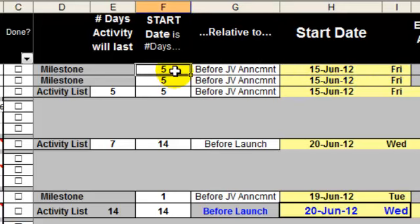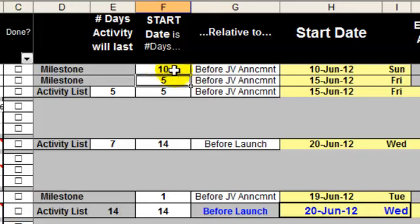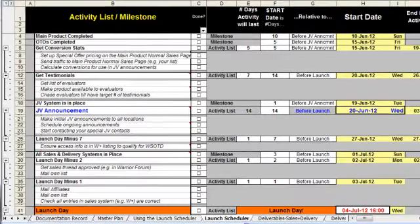I can change that and make that, say, ten days before. So I just change the number of days before in this cell and the start date automatically changes there.